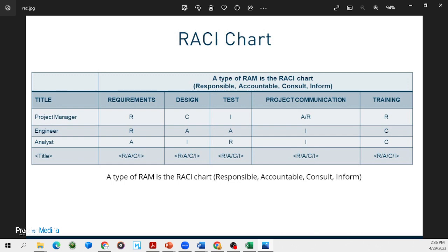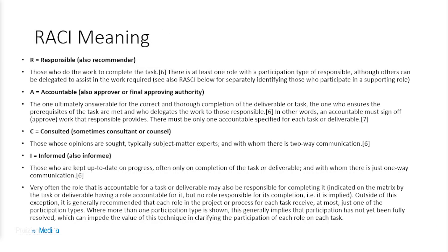Let's dive a little deeper. Responsible, also called recommender, refers to those who do the work. A stands for accountable, also the approver or final approving authority. C is for consulted — sometimes consultant or counsel — those whose opinions are sought, typically subject matter experts with whom there is two-way communication. I stands for informed — the informee — those who are kept up to date on progress, often only on completion of the task or deliverable, and with whom there is just one-way communication.